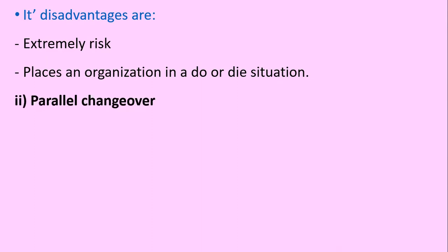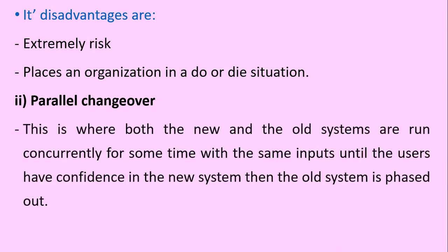Let's now look at parallel changeover. This is where both the new and the old systems are run concurrently for some time with the same inputs until the users have confidence in the new system, and then the old system is phased out.